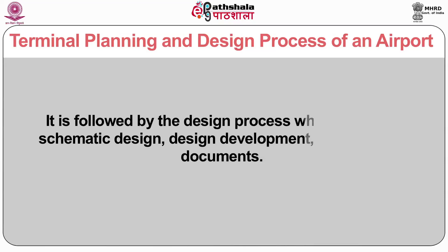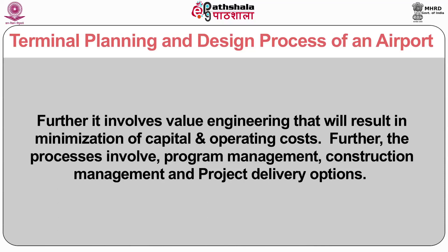The shortlisted options are again reviewed in a process known as concept refinement to further refine the terminal concept. Further, it involves concessional planning, conceptual phasing and program criteria. It is followed by the design process which involves schematic design, design development and contract documents. It also involves value engineering which will result in minimization of capital and operating costs. Further, the processes involve program management, construction management and project delivery options.